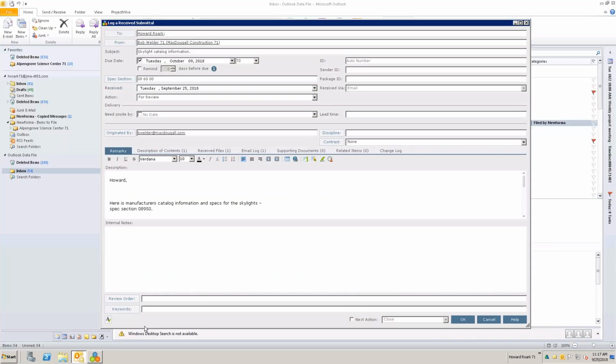Very good. Okay, perfect. So we've got all of this filled out, and if we're ready to forward this for review, then we can go down to our next action down here at the bottom, and we could forward for review. Now, if I was the reviewer and I looked at what was attached and I was ready to answer it, then I could simply go to the respond and close directly from here, like we were talking about with RFIs. I could even do that with submittals. But if I wanted to forward this for review, then I could just say forward for review.